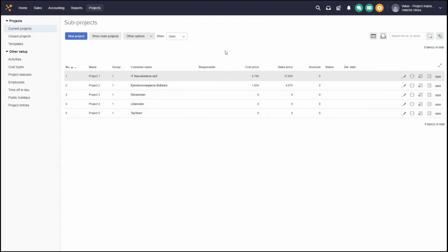The way to create them is in the menu out here. So out on project statuses. And here you can actually use project statuses for a visual overview of your projects. So over here, where it says status, you can actually write some information in here. One thing to note is that you can only enter a maximum of 15 characters here in this status.